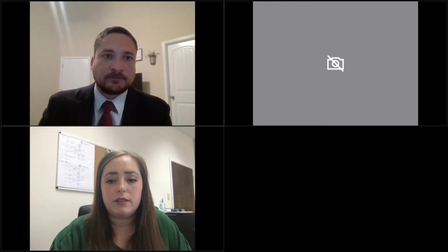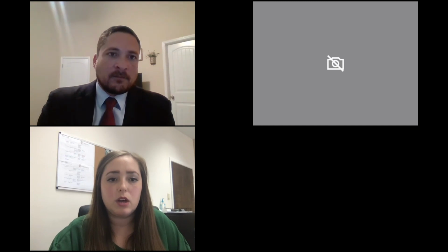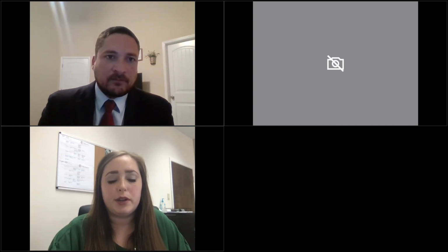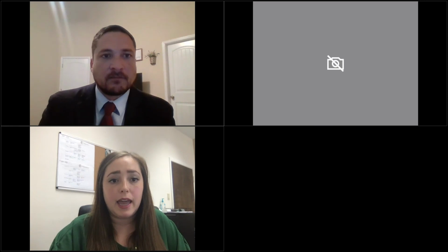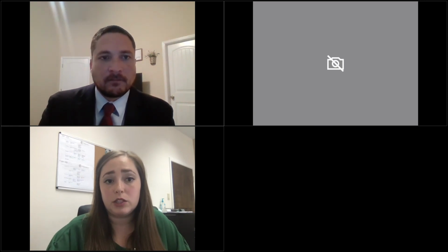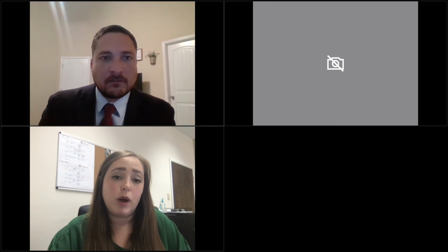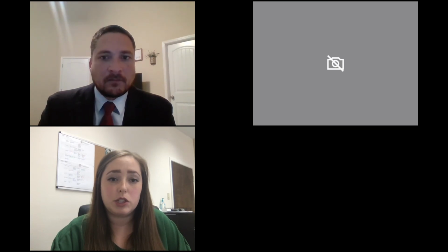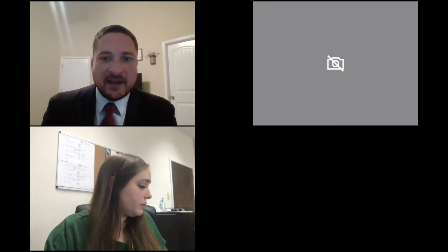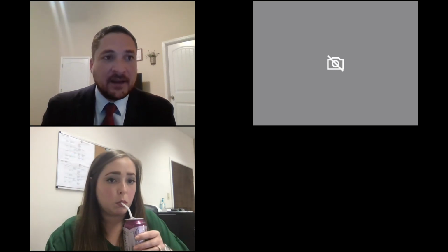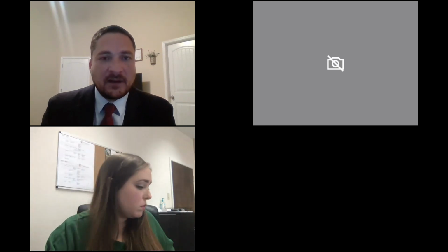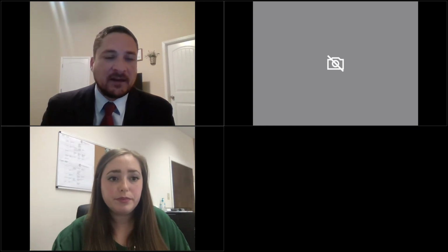Thank you, Joseph. And I have a question on a little bit of what you said. So if you fail to get the change order in writing, and at the end of the project, you end up having to file a lien or use your lien rights, if you don't have a change order in writing, does that mess up your ability to collect that portion? Well, as long as you send out something in writing, you don't have to have the actual change order in writing, but you need to send out the invoice for the work that you did, and then you can base your lien on that invoice and the timelines when the work was performed.